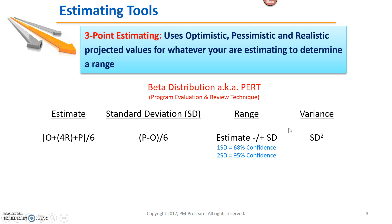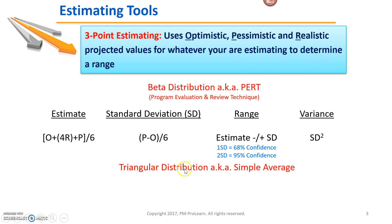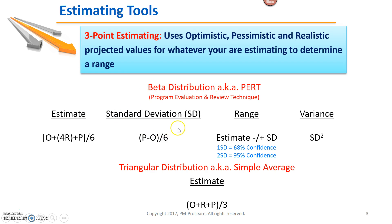We also saw a term called variance in the question. Variance is determined by taking the standard deviation and squaring it. If you square the standard deviation, it gives you the variance. Now, if you use a simple average, that's also called a triangular distribution — that's just adding the three numbers together and dividing by three, a simple average you learned in elementary school. The trick on the exam: if you see the term triangular distribution, use the simple averaging method. But the default method on the exam is to use the beta distribution, which requires a couple more steps.